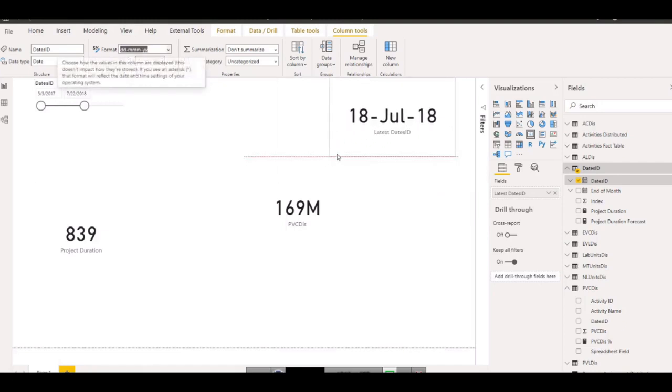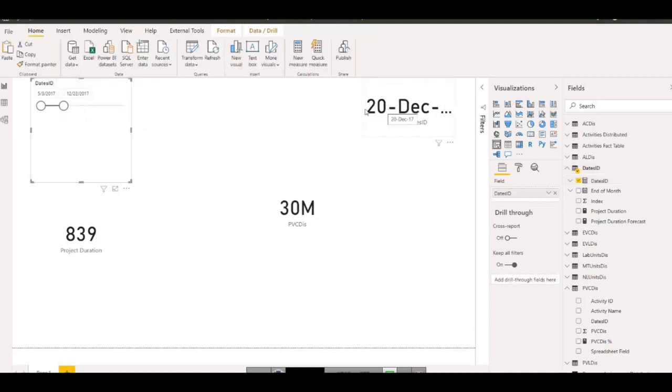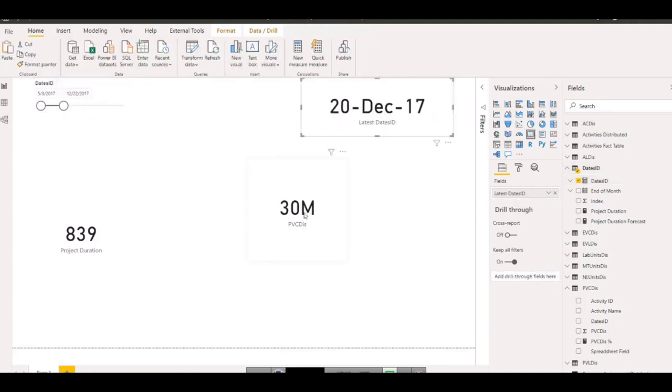So now what I want to show you here, this becomes your data date. In P6 you cannot change your data date backward and forward and see the result because you have already applied the actuals. But in our case, if we want to see what happened in the past, let's say I'm back here, so the date is changing here and also the values are changing.